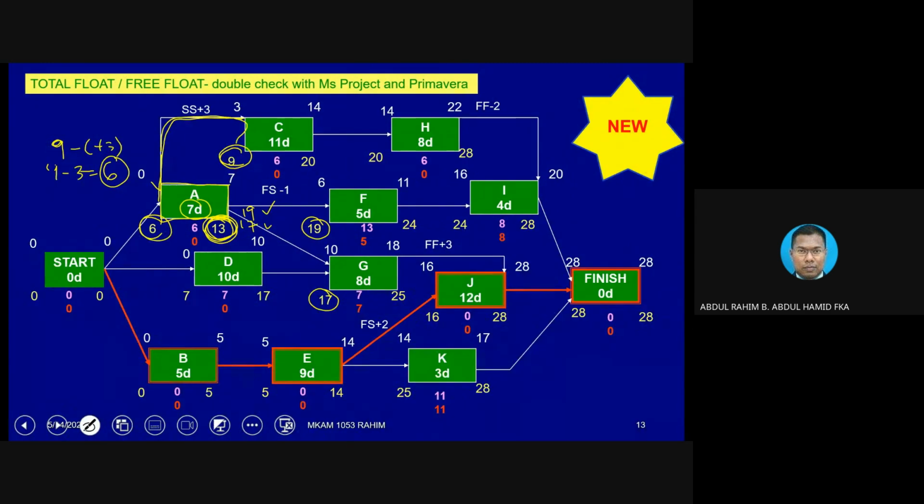Okay, now all the boxes are filled up, and you notice that we started with 0. We started with 0. And then how do we get this value? This value we are going to get from either A, D, and B. You notice in B we do have 0, and 0 will be transferred here. 0 minus 0, and we are going to come back with 0.